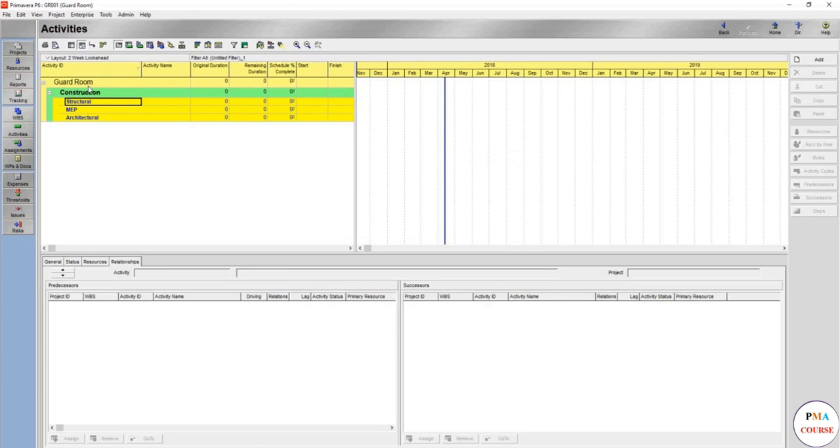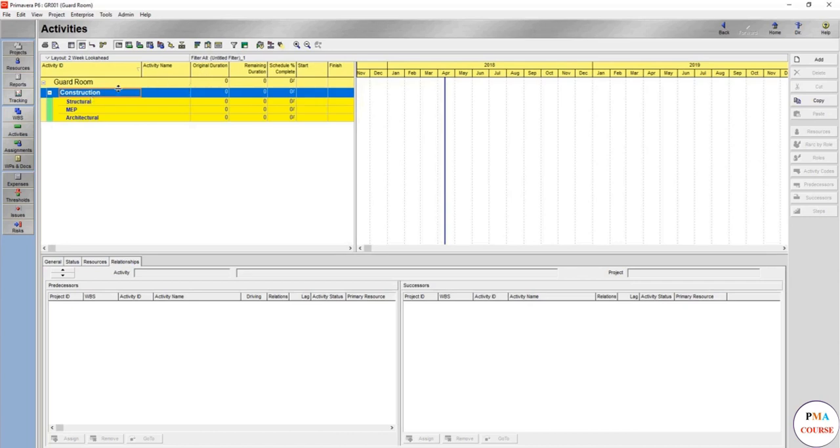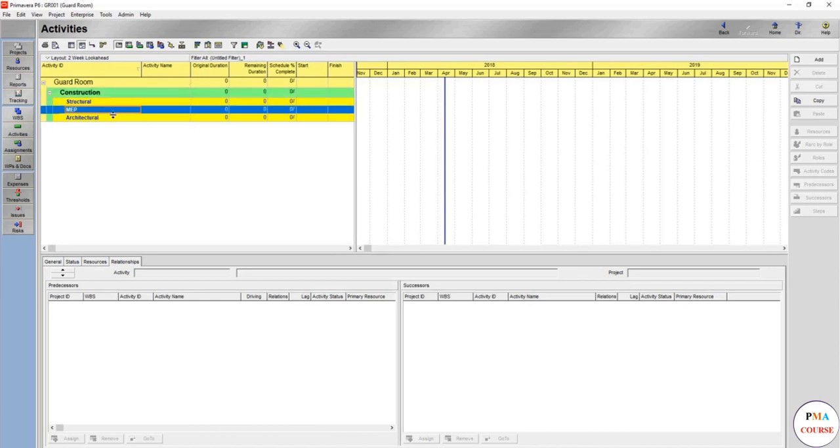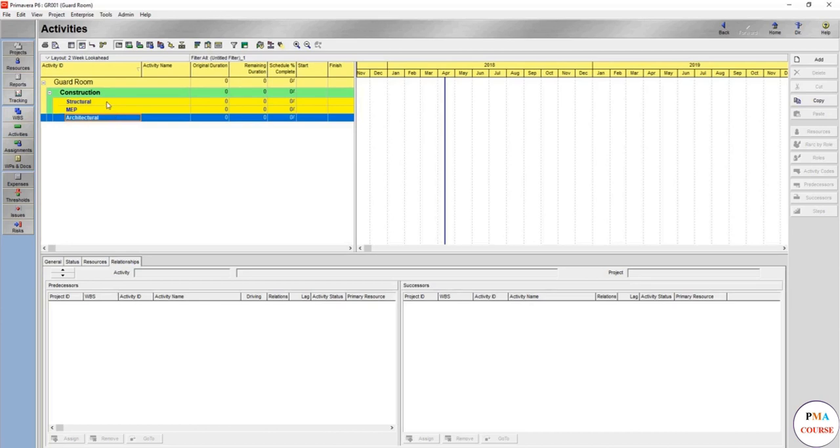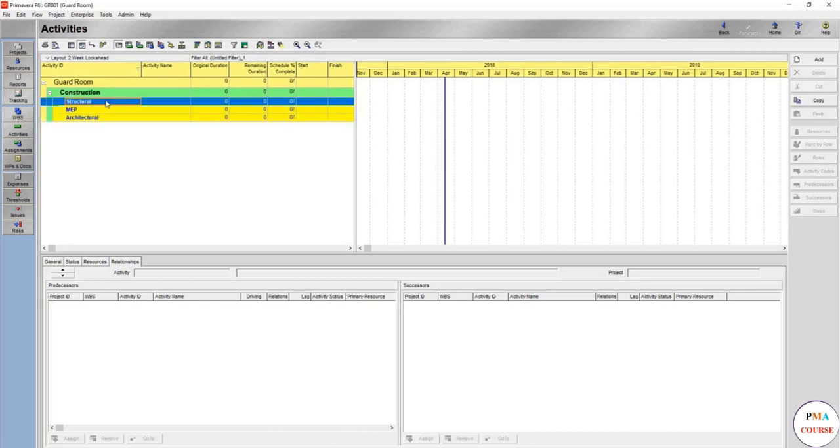So if you really want to see your WBS you will just untick it, then apply, and here it appears to you as you want. Guard room, which is the project construction. Assume we are working on construction project only - you have the engineering ready and the procurement is ready. So structural, MEP, architectural - these are the WBS that you have just created. To add an activity here, the add button will add the activity not the WBS because you are in the activity tab. Press it.